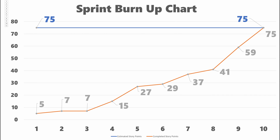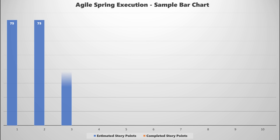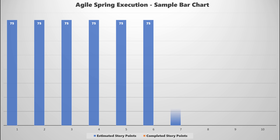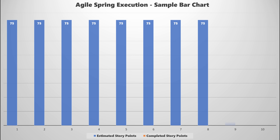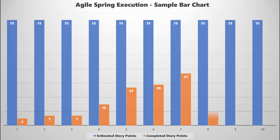If you look at the sample, you can see that 75 story points were estimated, and then the completion over the period of 10 business days were 5, 7, 7, 15, 27, 29, 37, 41, and 59.